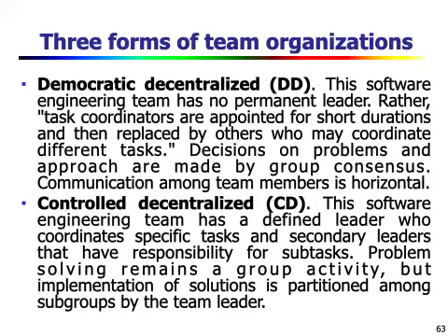Democratic decentralized means this software engineering team has no permanent leader. Rather, task coordinators are appointed for short durations and then replaced by others who may coordinate different tasks. Decisions on problems and approach are made by group consensus. Communication among team members is horizontal. That is democratic decentralized.